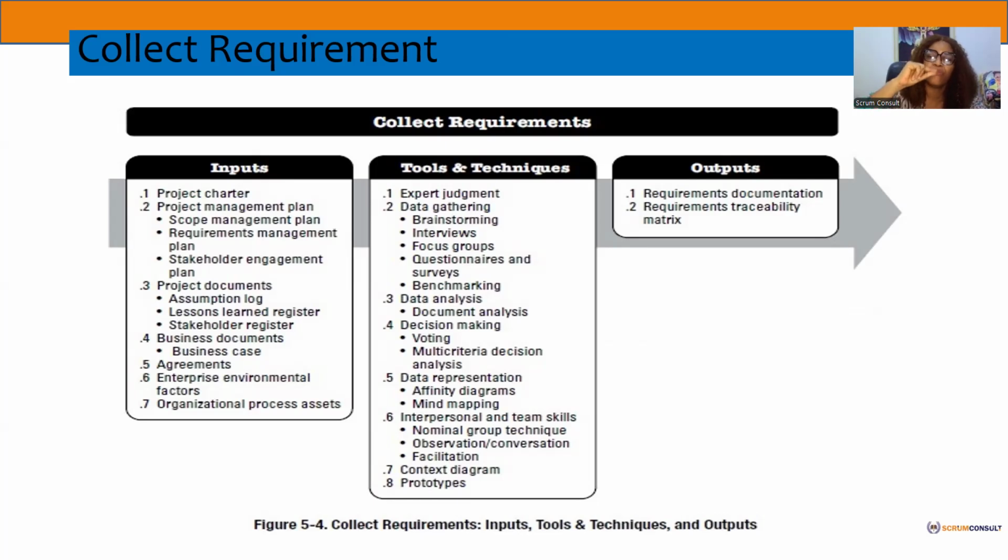And as such, for you to know how to properly engage your stakeholders, the stakeholder engagement plan would have consisted of the list of your stakeholders, who your stakeholders are. It would have also told you their different levels in the project, their power, their authority, their interest in the project. And as such, you would have come up with how to get their support to create that need in terms of resources, approvals, validations, anything that you need from them.